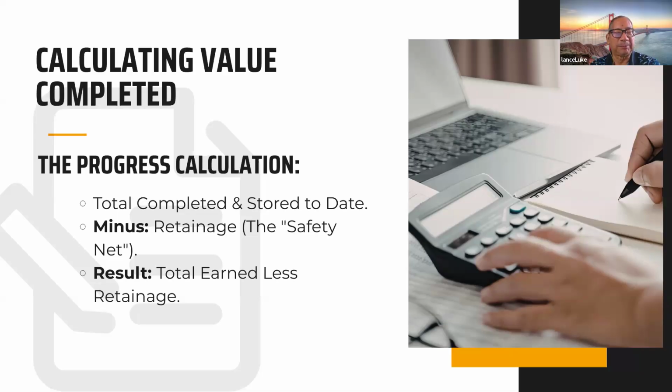Now, interesting information: if the contractor submits an invoice for $50,000 of materials, but it's not stored on the job site, industry standard says that the contractor doesn't get paid for that. Now, there are different scenarios where the contractor could be allowed to get paid for it if it could be verified that those materials were at the contractor's warehouse and it can be inventory.